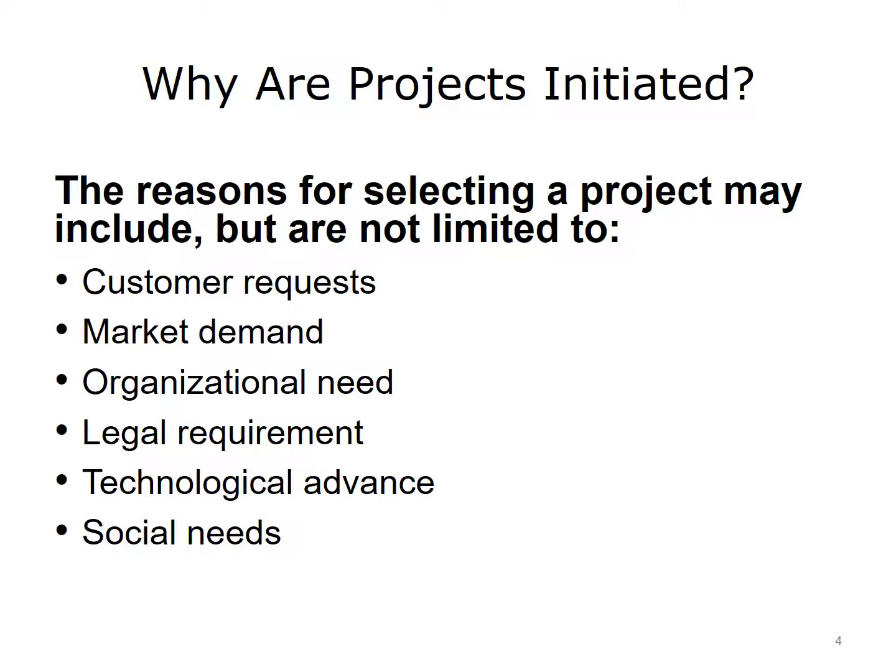Once the project is selected and a project charter exists, the project initiation is completed and the planning process can begin. Remember, the project charter authorizes the existence of the project, designates the project manager, and provides the project manager with the authority to acquire resources and lead the projects. Some of these reasons include requests from customers, market demand, organizational need, legal requirements, technological advances, and social needs.